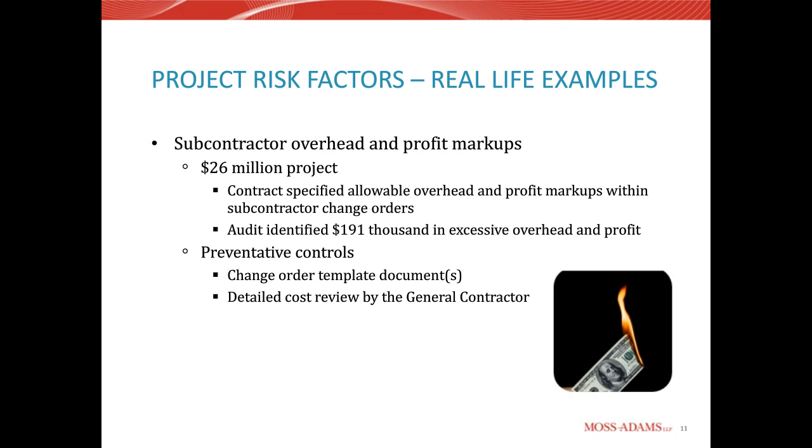For this particular example, having change order template documents can be really important. I've seen a number of subcontracts or even prime contracts that provide template documents that are specific to the contract terms. So if the contract says you get 10% overhead and 5% profit, those template documents will be set up in a way that shows those are your maximums. And then anytime a subcontractor goes to submit a change order, they use that template document.